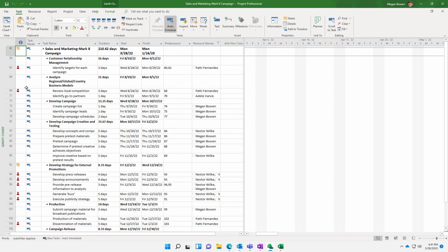One of the reasons that I had you place this file in your OneDrive for Business is those files are automatically versioned, and you can revert back to a previous version at any time if somebody messes up your file. Open the previous version, save and synchronize it, and have the project file override what's in the SharePoint list. That's my tip for this week.